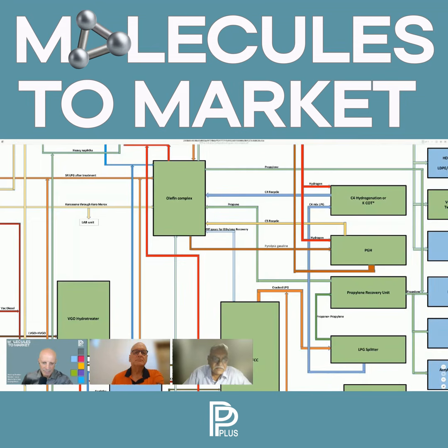That is like an EPC contract for the owner, but implemented on the EPCM route. That means the contractor who is selected will become responsible for implementation on an EPC schedule, and he will agree to all penalties of that.